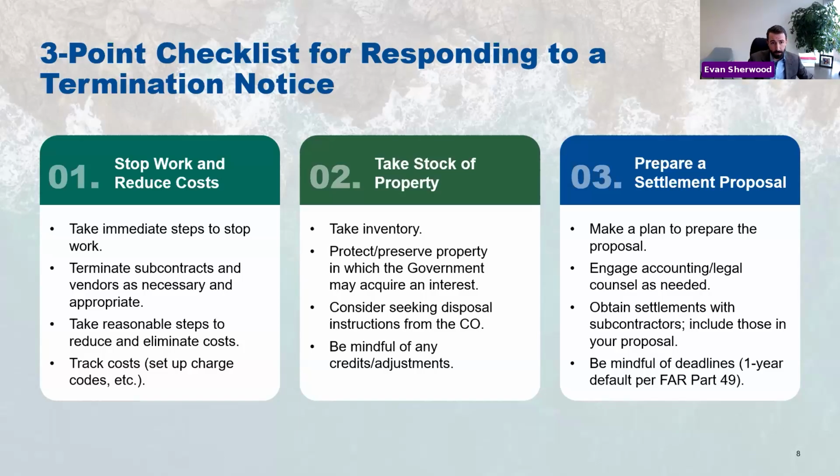And everyone should be mindful that under FAR Part 49, which again is for non-commercial contracts, there's a 1-year default deadline for submitting a termination settlement proposal. A lot of agencies will apply that to commercial agreements as well.